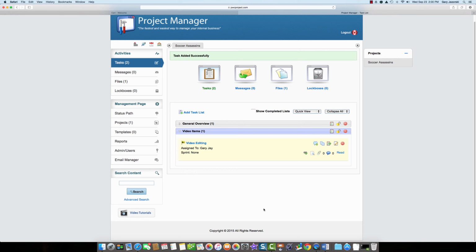So we take an entire project, we take all the tasks in the project, and we create sprints week by week by week, and we do a 1 week forward planning for particular tasks that we're going to get done in the next week. The sprint function makes it a lot easier to manage a highly complex project or a project with a long-term duration.